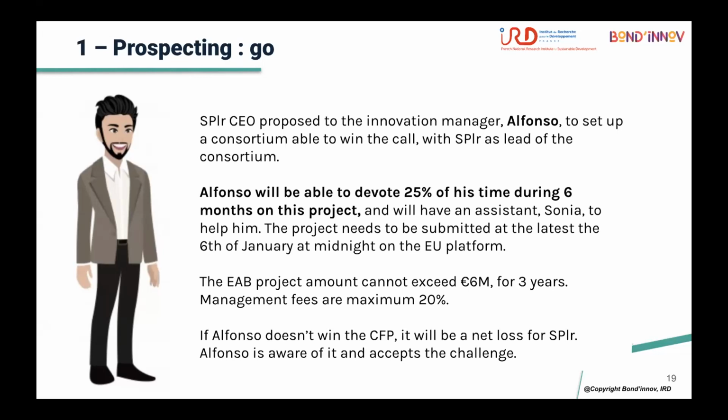So Alfonso will be able to devote 25% of his time during 6 months to this project. This is really very, very important. And this is my advice also for our institutions. When we aim to win calls, we need to designate some responsible persons and give them the time and the means to prepare the response to this call.